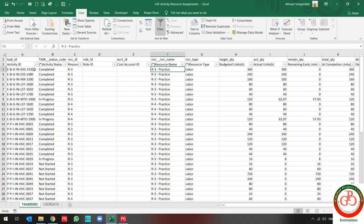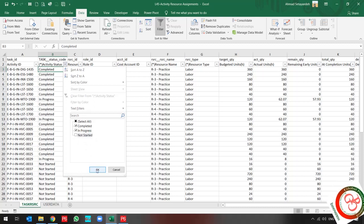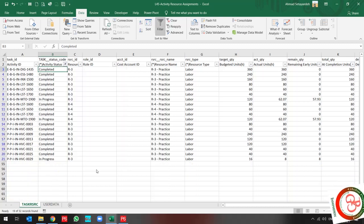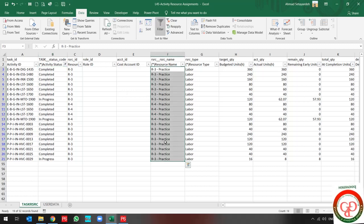Since I already updated my activity sheet, it is not necessary to use any update for not-started activities, so I filter them. Now I should only update the in-progress and completed resources.